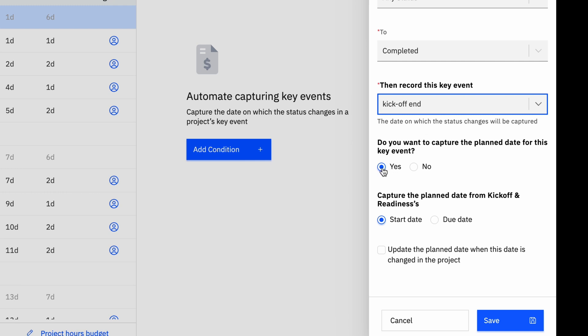Under Do You Want to Capture the Planned Date for This Key Event, select Yes if you want to track the planned date of projects that utilize this template. This will enable you to compare the actual date captured during the status change with the planned date established in the project. You can use this information to determine whether the key event is delayed or ahead of schedule.